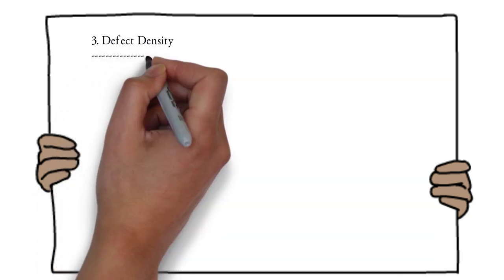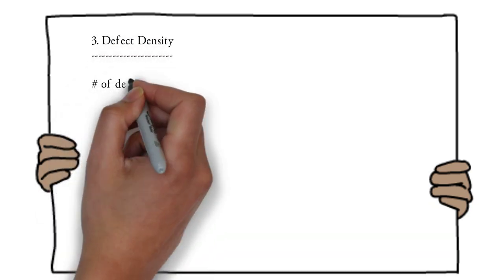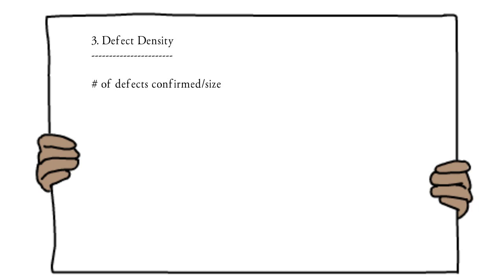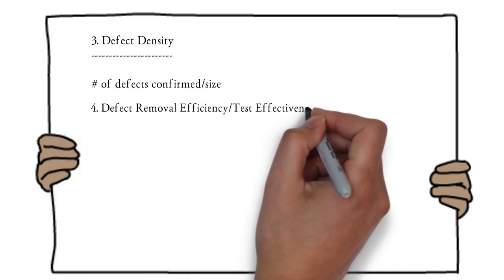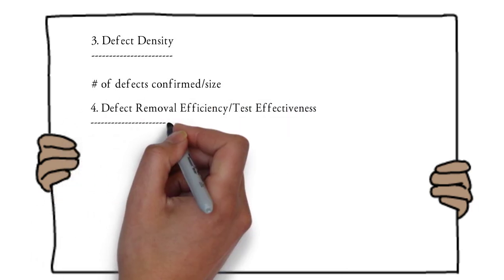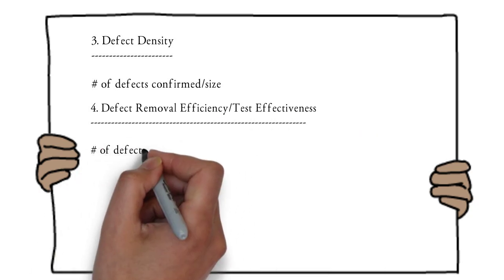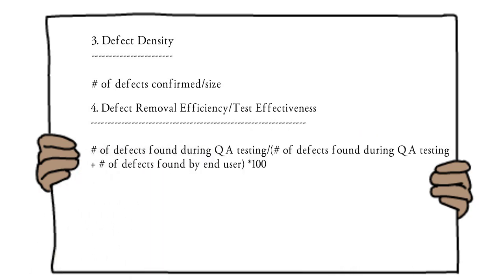The third calculated metric is defect density, which helps find out the volume of defects raised in a particular functionality or module. This is calculated using the formula: number of defects confirmed / size. The fourth metric is defect removal efficiency, also known as test effectiveness, which measures how many defects were removed during testing.